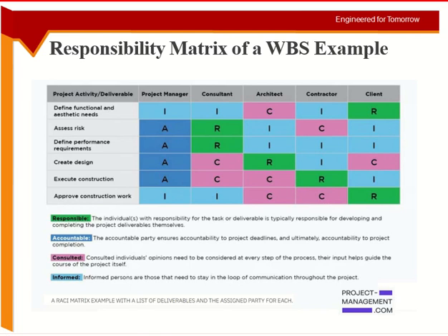The consultation happens, the C part happens with R. The person who is responsible is supposed to consult, he is supposed to take information from the others. So consultation means you are taking the background information, the necessary data which you need for this activity. This is what we mean by consultation. And information happens after. And before information, there should be an approval. So you cannot pass on half cooked information.